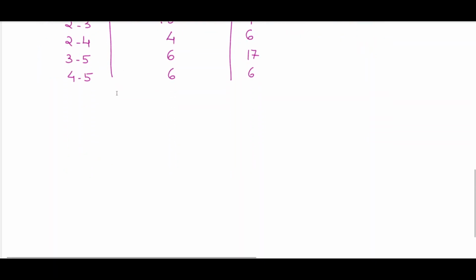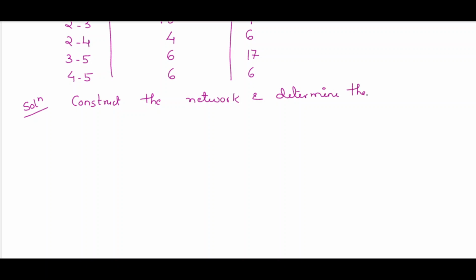First of all, as usual, for any resource leveling problem or resource allocation problem, the first step is we have to construct the network and determine the critical path.